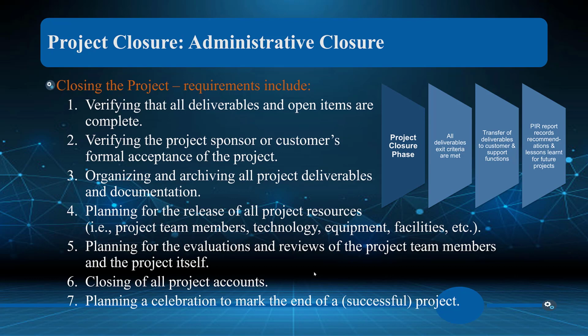By the way, as a consultant, I had a mentor who said, analyze your customers. So we would go back and analyze our customers. We would analyze how well they gave us information, how well they cooperated. Were we constantly waiting for stuff, which meant we were losing money because we didn't have the information or the deliverables or the data to move forward? How well did they pay us? And then we would grade customers. And frankly, if you fell out of an A and B category, we probably didn't work with you again.